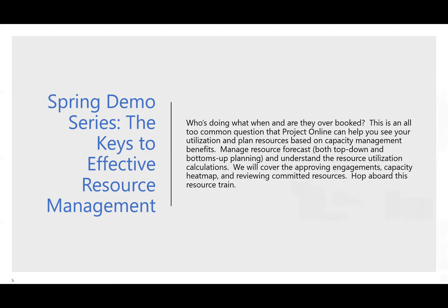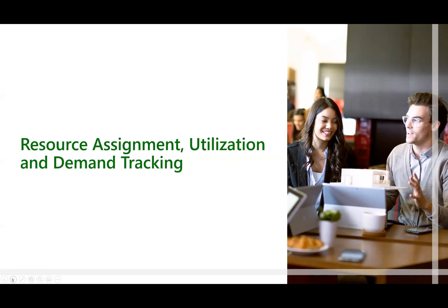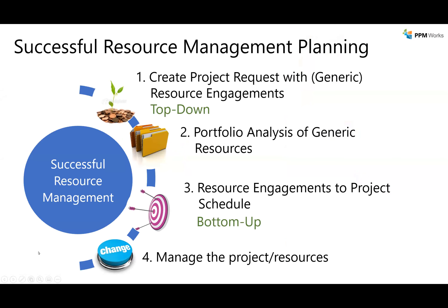We're going to start with resource assignments, utilization, and demand tracking. Let's back up and talk about successful resource management. Within the toolset there are a couple of different ways to do this. One approach is top-down, which we call resource engagements — where you go in and say 25% of a resource across four or five different projects. You can spread it out; it's quicker and easier. You may only track at the project level, and that's a great place to get started.